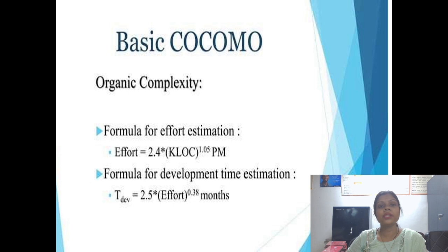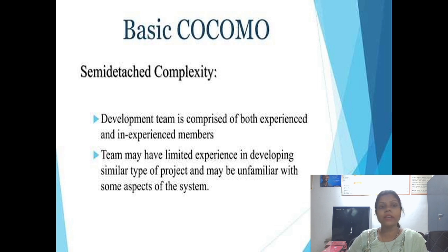In the basic COCOMO model with organic complexity, how can we calculate effort and development time? Here is the formula: effort is equal to 2.4 into KLOC to the power 1.05, in person-months. For development time estimation, time of development is equal to 2.5 into effort to the power 0.38, in months. We have to learn these formulas by heart, because from them we can calculate all this product cost estimation.